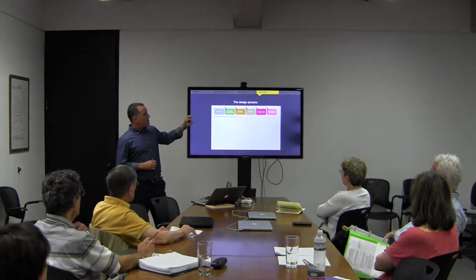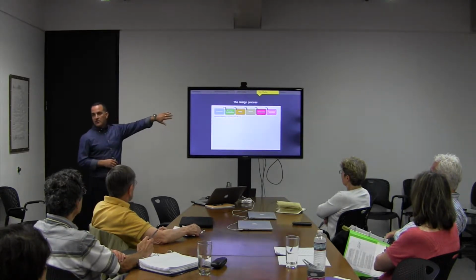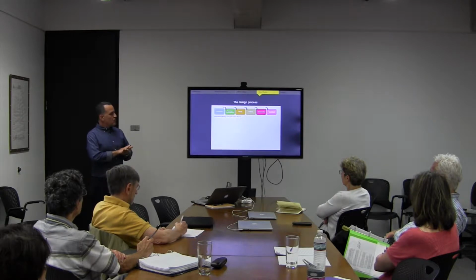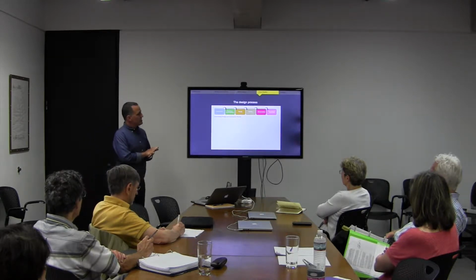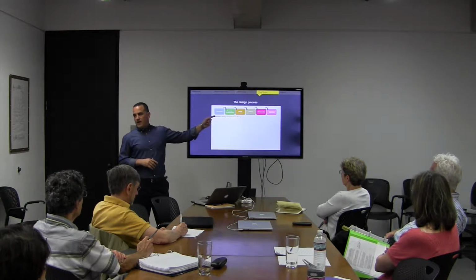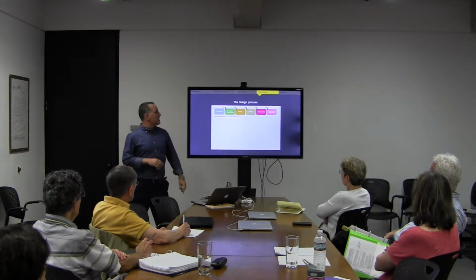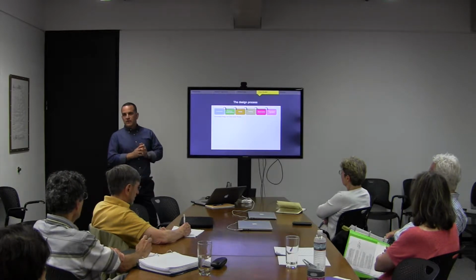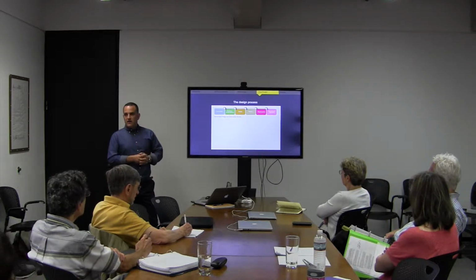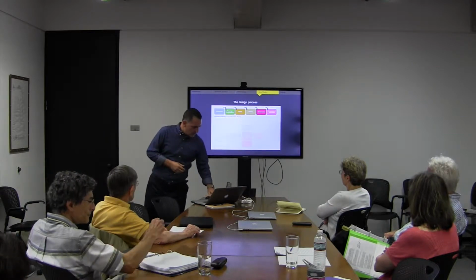So a quick word, just for reference, the conventional design process in architecture, if we try to really even out all the differences, is really straightforward. It's very sequential, and these arrows are what would be called the waterfall effect. So no step can begin until the step before it has finished.